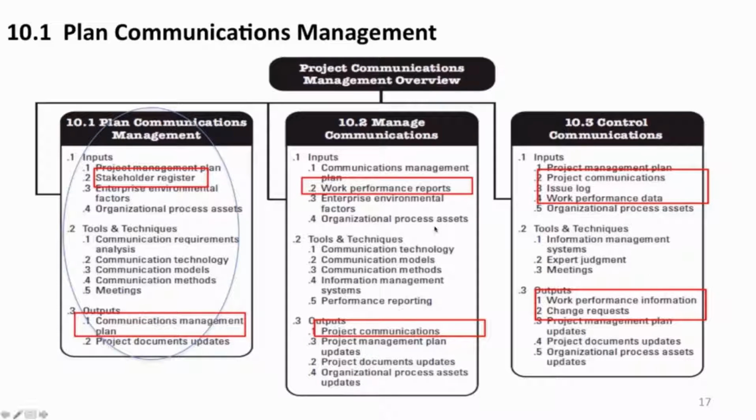The main input, as we'll see, to planning your communication is your stakeholder. Even though it's exceedingly important you communicate properly with your team, it is the stakeholders that you give the highest priority to communicate with. They need to know what's going on in the proper context for them. So the stakeholder register is a key input here, and the key output down here is your communication management plan,